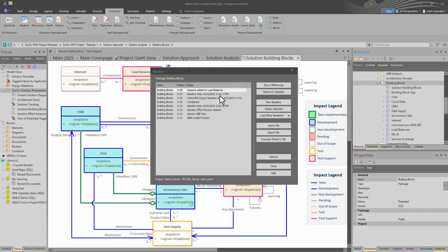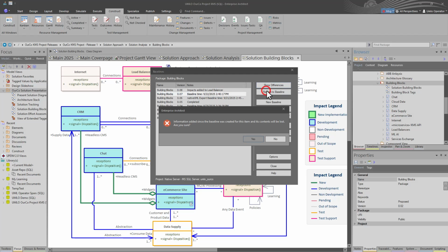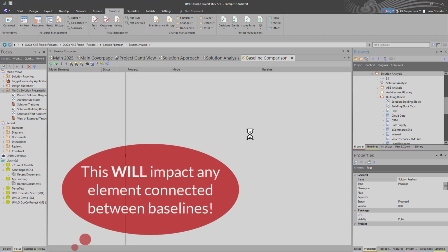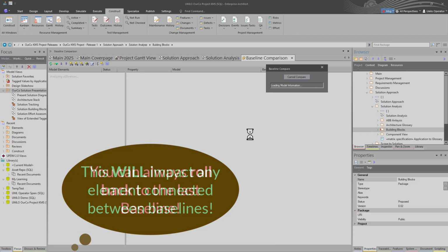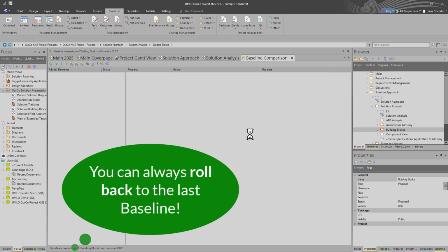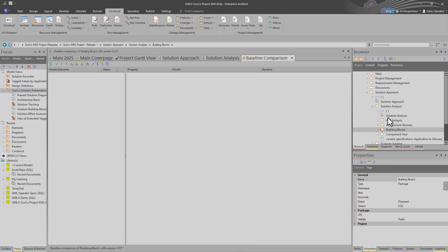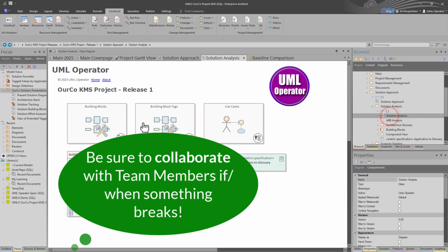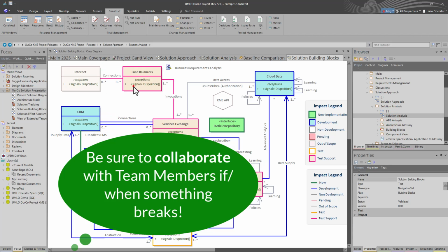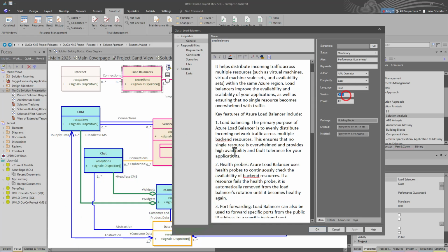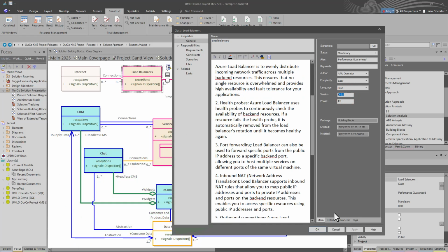In some cases, you may need to fall back to a baseline previously, but make sure that everyone understands what this entails, what it impacts, when to fall back, and how to get approvals to fall back. Because if you're in a team environment, you want to make sure that your team is falling back to particular versions to make sure that they understand this fell back to version 01, had some changes in it.